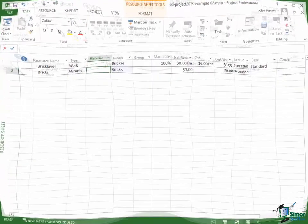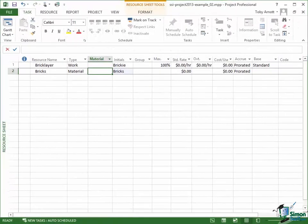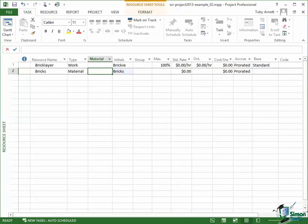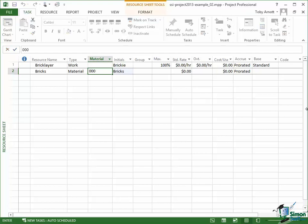Now I tend to think that that field name there, material, isn't a particularly helpful field name because what that field actually represents is the units of measure of the material. Now in the case of bricks, we're going to talk about bricks in thousands. So my unit of measure is going to be that thousands. I could put the word thousands.